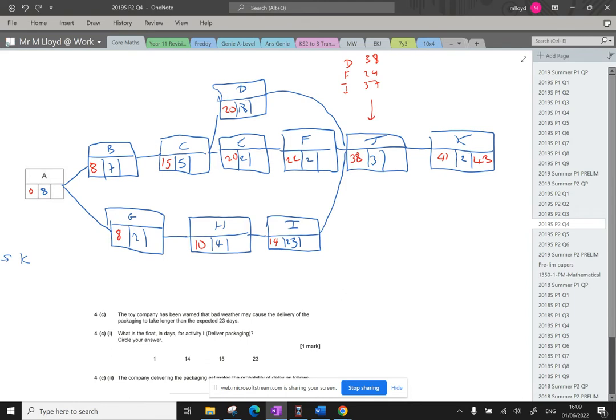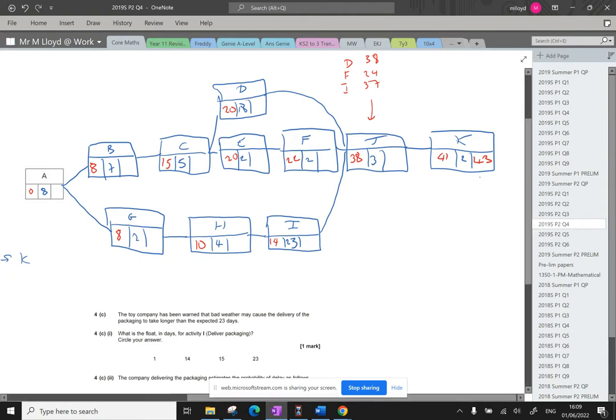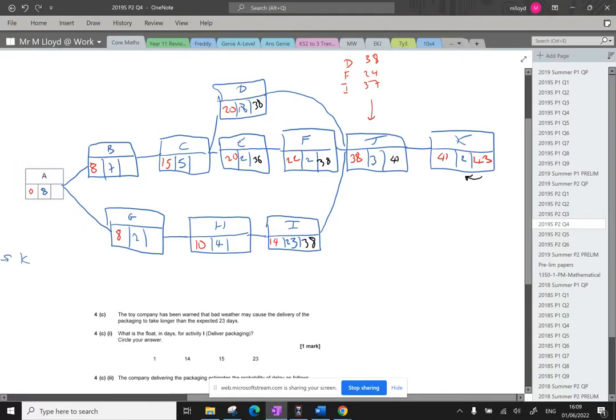So this is going to be the latest sort of finish time. 43 take away 2, so we're working backwards now. That's going to be 41, so that's for J. 41 take away 3 is 38, which means all of these are going to be 38. And we only have a problem when we feed into a different box. 38 take away 2, 36. 38 take away 23 gives us 15. 15 take away 4 is 11.